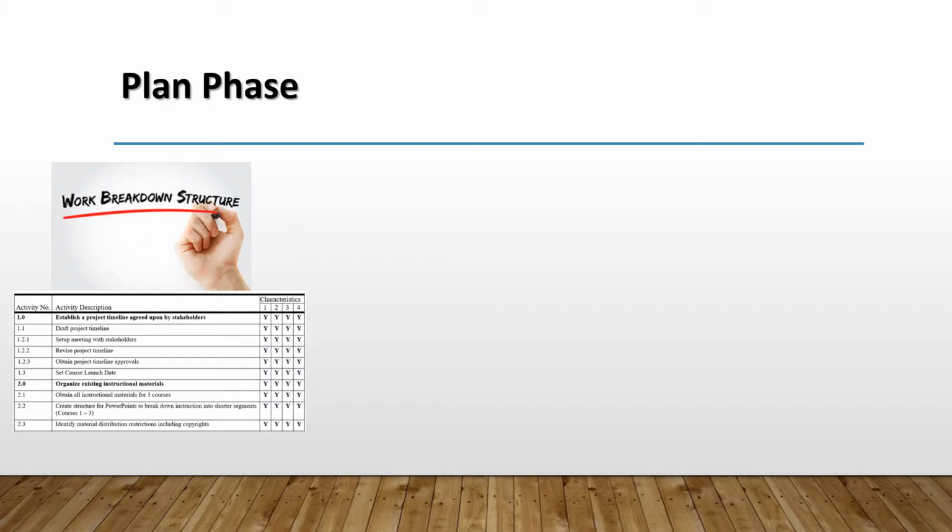To achieve the goals stated in the define phase, we move on to discussing the plan phase. In this section, we identify the activities required to complete the project. This forms the project schedule. The project team uses a hierarchical representation of the project defined by using a work breakdown structure. This method allows our project team to take complex problems and solve them by breaking them into small, manageable tasks. These small tasks or activities can be completed on predictable schedules by persons with defined skill sets that match the task. The work breakdown structure is the basis for the planning documents used throughout this report.